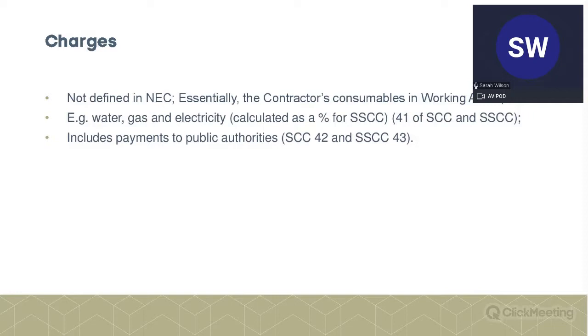Now, sorry, for the shorter schedule of cost components, all of these are calculated as a percentage. So it's a percentage of the people cost. So we saw number one is the people cost. So if you think about it, this is what you're using for options A and B, your fixed price contracts.